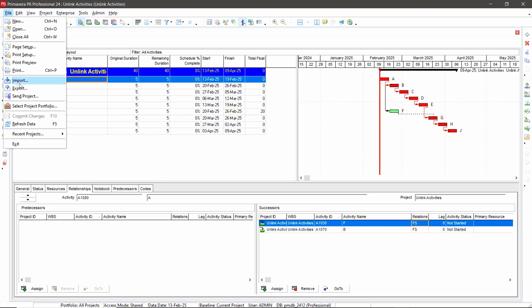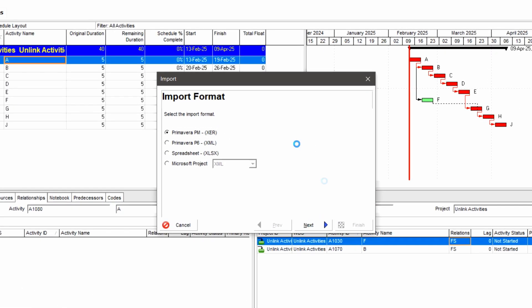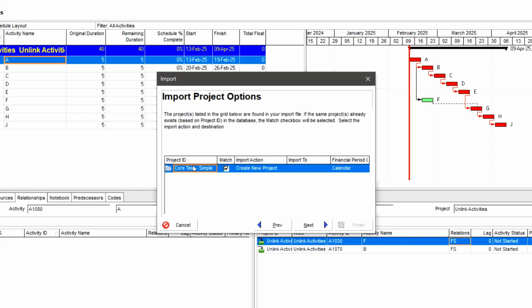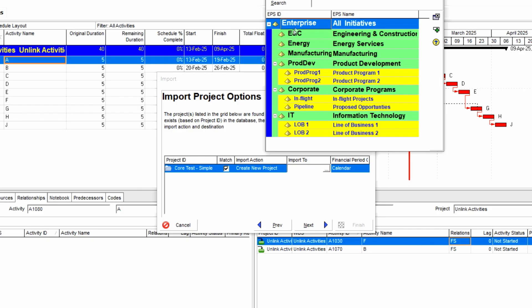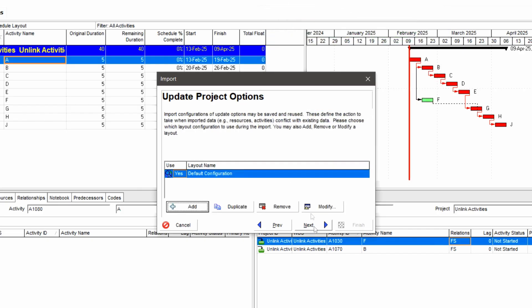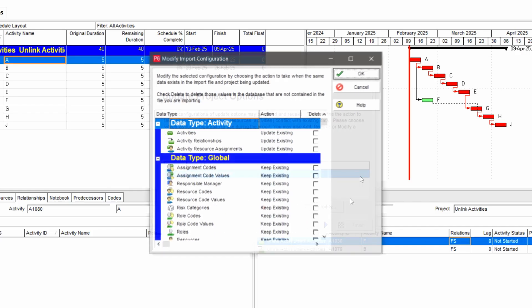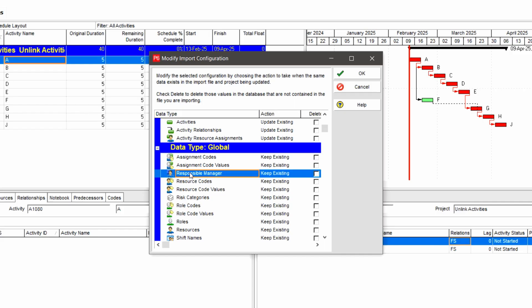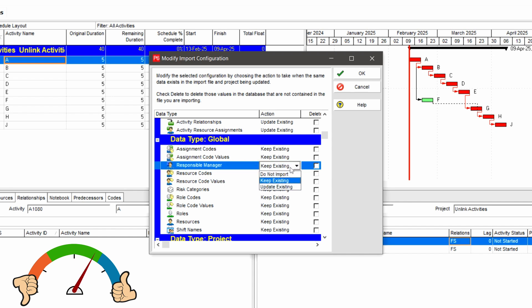Let me show you where to find that. Back in P6, if we're importing a project — a regular XER file — it's when we get to the 'Update Project Options' screen. In these configurations, if I modify the configuration, you'll now see 'Responsible Manager' in the global data type listing. It wasn't there before. We can now say 'Do not import responsible manager' and keep our OBS responsible manager hierarchies pristine. That is a thumbs up.